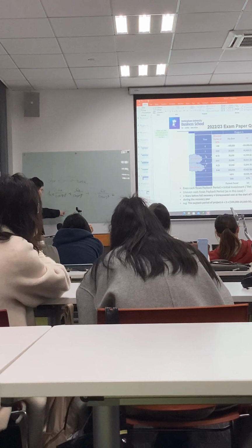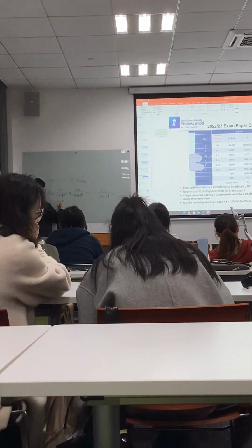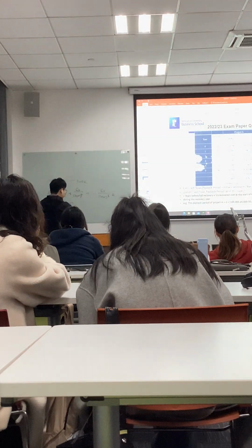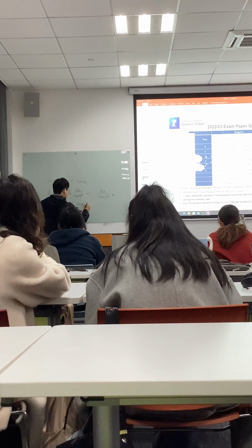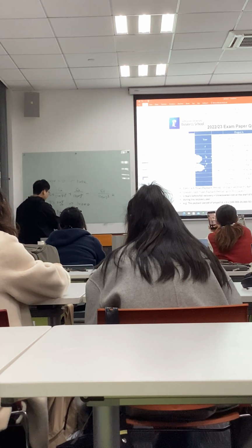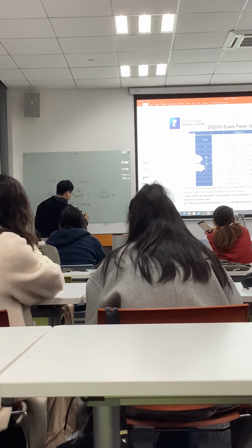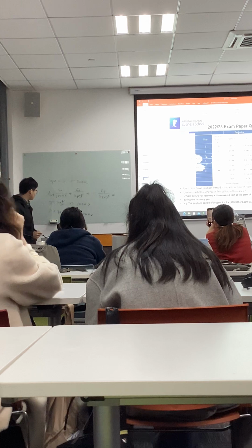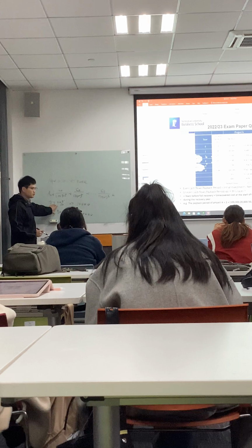So use plotting methods. We substitute, for example, R equal to 20%. We may have an NPV, I just give an example, equal to 10,000. And then if we substitute 50%, then it may become minus 20,000. Alright, so these two equations tell us the IRR must be between these two, right?